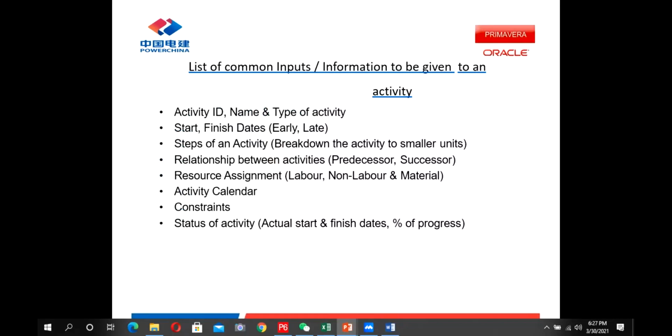Are these schedule levels made differently, or are these just WBS rolled up? When we roll up our WBS, we get level 1 or level 2. WBS levels are something different. You cannot correlate them, but in general terms, WBS level 1 gives the information of the level 1 schedule. At the project level, it gives you the start and finish date. The same can be your level 1 schedule, which gives you the same information.